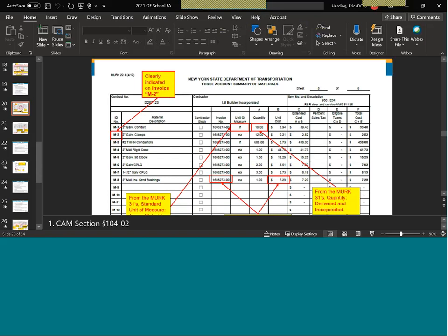You should be able to go through the material invoices and receipts and very clearly see M2 somewhere. It should be written right on the receipt, M2, 2-inch galvanized clamps. And you can follow right through invoice number, units. Here again, we're talking about a normal unit. Obviously, a clamp is going to be in each.